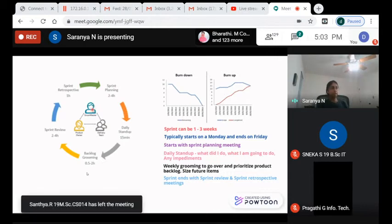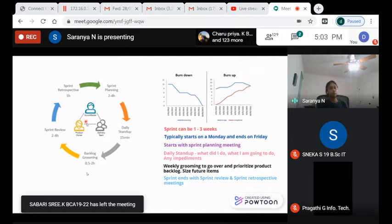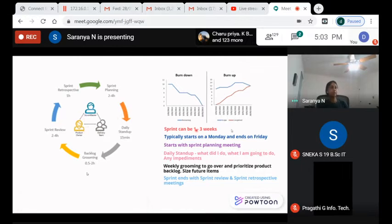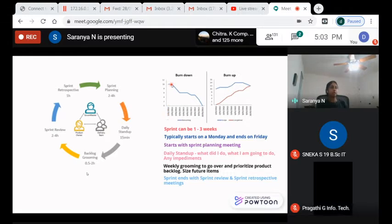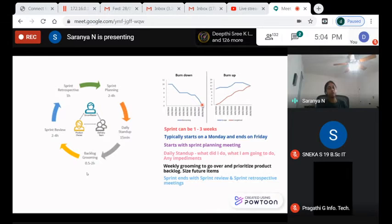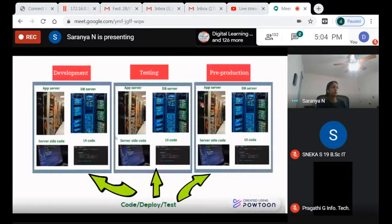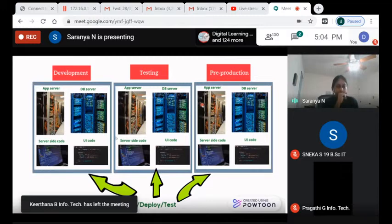The scrum master hosts all of the meetings. We have a delivery team — the development team — and a product owner. There's also a burndown chart: on the first day of the sprint we have a lot of work, we start working through it, and the line goes down. If the line goes flat, something may be blocked. It just tracks whether we're heading in the right direction.